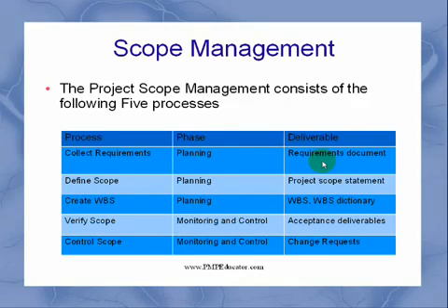Once you have the requirements document, the next process is define scope, where you define what the boundaries of your final deliverable are. The deliverable is the project scope statement, which covers the limitations and boundaries of your project, and this is also in the planning phase.